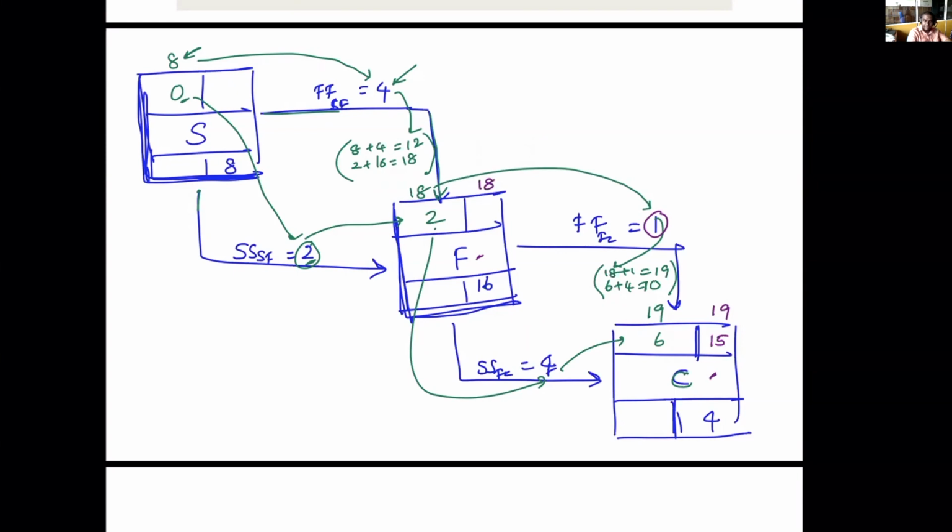The complication comes when it comes to finding the starting value. So here we have 18 minus 16 equals 2 from the duration. And there's a link from start of F to start of C. You have to respect that as well. So this is 15. Minus 4 should also be there. 15 is this value. 4 is this value. That should be there. So we take the lower value. For the finish of this, there's only one link. This finishes on 18. 18 minus 4 is 14.